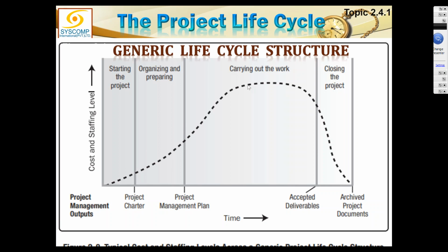This is where actual execution is in its full form, and then things start getting completed, and as and when the jobs are completed, our expenses start coming down, and ultimately at the closing of the project our expenses come to a close. Staffing is laid off completely at the end of the project and the project is done. So this is a general cycle, and you can see that the expenditure on the project, whether daily, monthly or periodic, would show a pattern like this.